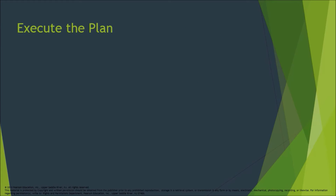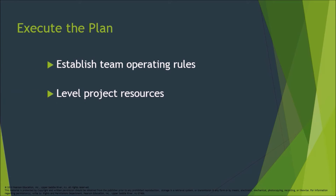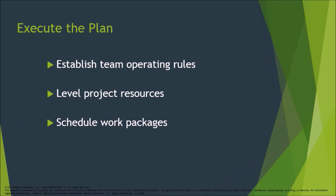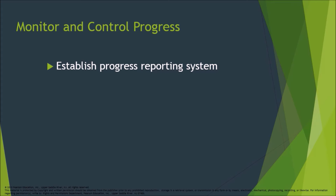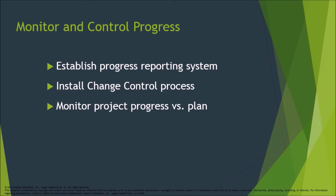Execute the plan: Establish team operating rules, level project resources, and schedule work packages. Monitor and control progress: Establish a progress reporting system, install a change control process, monitor project progress versus plan, and revise the project plan as needed.